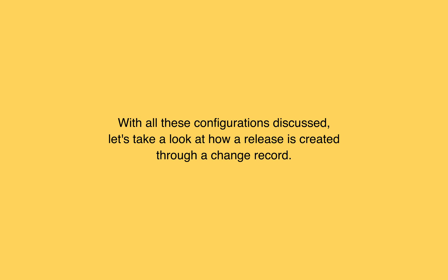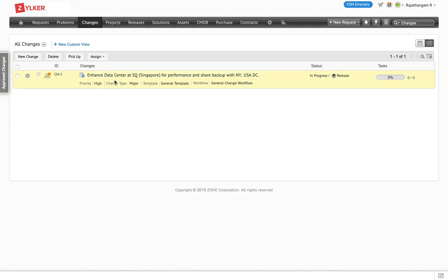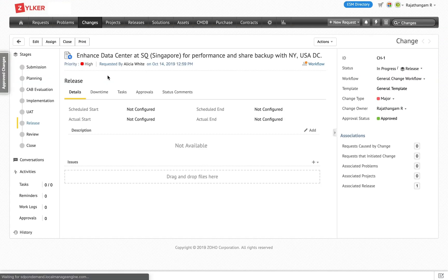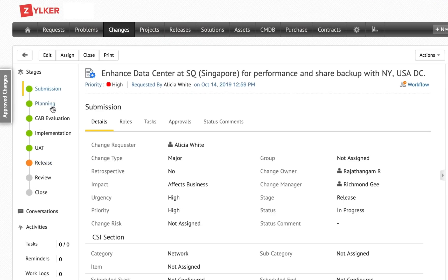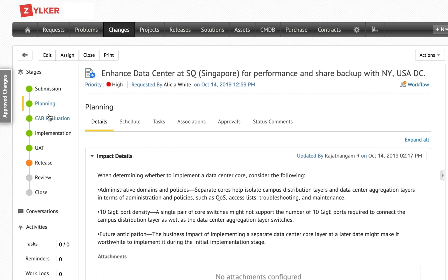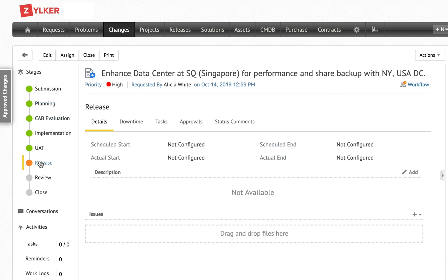With all these configurations discussed, let's take a look at how a change record is created and how a release is created through it. Here is a change record created by Zilker to do performance testing on their Singapore data center, and at a crisis situation they wanted to offer backup to their New York data center. The change record is created, planning is proposed and approved, and once approved the stage goes to release. Since change management stages are fixed, you can define the workflow to skip stages on a change record.